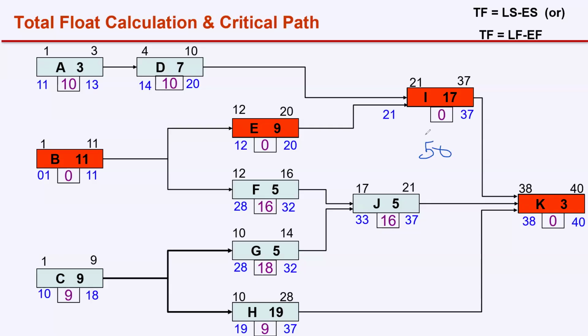Now when I'm doing the calculation, I'm seeing I can finish this project in 40 days. So this difference, between the pre-imposed agreed end date and your calculated end date or duration, is the project float. My calculation shows I can comfortably finish this project in 40 days.